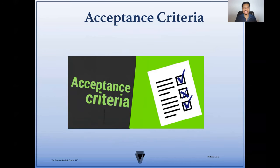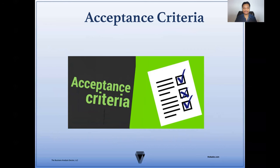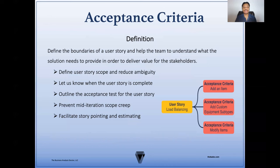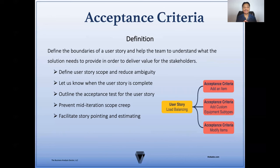Now let's take a closer look at acceptance criteria. Acceptance criteria define the boundaries of a user story and can help the team understand what the solution needs to provide in order to deliver value to the stakeholders. Acceptance criteria define the user story scope and reduce ambiguity by decomposing that user story, letting us know when the user story is complete. It also outlines the acceptance test for the user story, and it can prevent mid-iteration scope creep. Acceptance criteria also facilitate story pointing and estimating — it can be very difficult to size or point a story if you don't have the acceptance criteria to let you know what's involved.